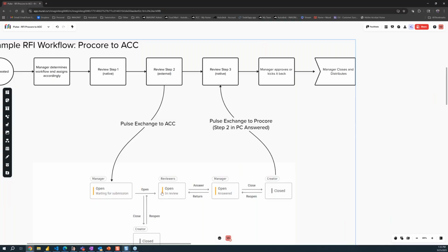We can read the review template that's assigned in one environment, and as long as the name of the review template is exactly the same in the destination project, we're able to assign that template in the destination. That allows us, instead of pushing it to the manager step of the submittal, to get it right into the review step of the submittal.